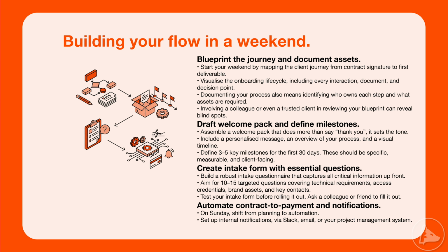Saturday afternoon, draft the welcome pack and milestones. Next, build a simple welcome pack, not a massive PDF, just something that makes clients feel guided. Include a friendly intro. What happens next? A timeline for the first 30 days, where to ask questions, what you need from them. Then define 3 to 5 milestones for the first month. Client-facing milestones like intake completed, kickoff held, brief approved, first deliverable sent. Milestones create momentum and prevent scope drift.